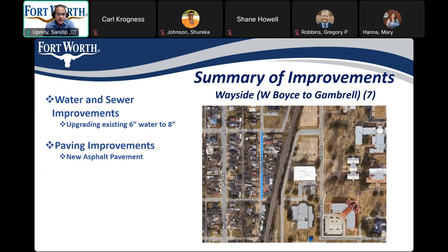Now I'll go through the street improvements funded by the Water Department. West Side Avenue from West Boise to Gambrel Street is within the scope of the Water Department. The proposed improvements include water and sewer improvements that upgrade the existing 6-inch water to 18-inch water line. The paving improvement includes new asphalt pavement. We will not replace curb and gutters, driveways, and sidewalks unless they are in bad shape or damaged during construction. The proposed improvements for Water Department-funded streets are similar to each other.